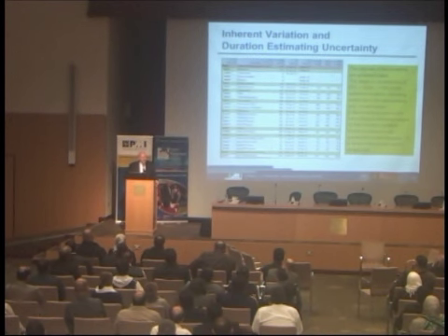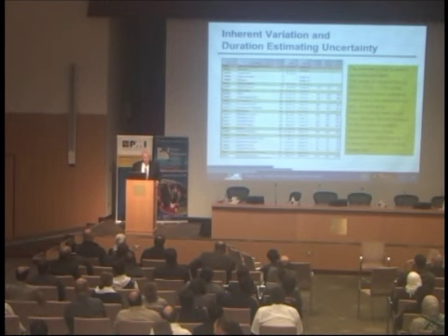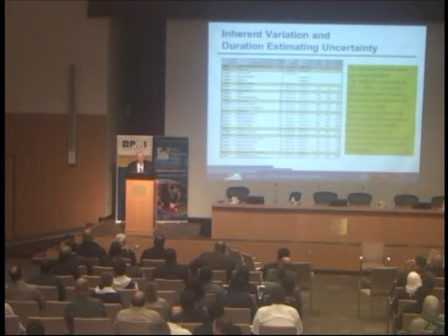Because of the logic at merge points, the only way that the merge point can be early is if both paths are early. If one is 10% late and the other is 10% short, it's late. If they're both 10% late, it's late. Only if they're both on time or early is the merge point early.